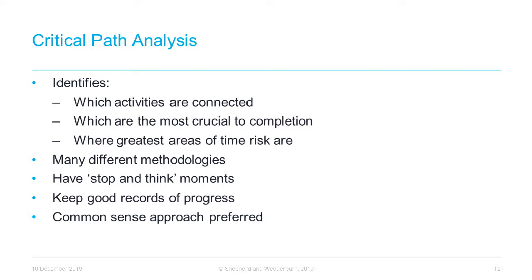There are many different kinds of delay analysis methodologies, and choosing the most appropriate depends on the factual and legal circumstances, as well as the availability of evidence. Efforts to undertake this analysis are often constricted by the availability of records, and so it is very important to keep adequate records of work and progress, particularly where there is a likelihood of delay. Photographs with a time and date stamp are a particularly helpful piece of evidence.